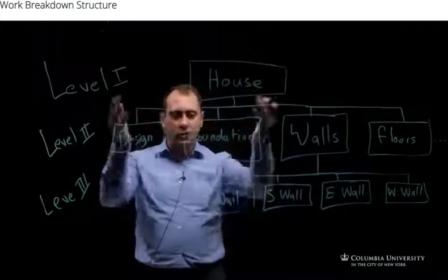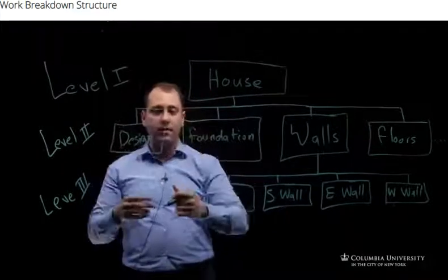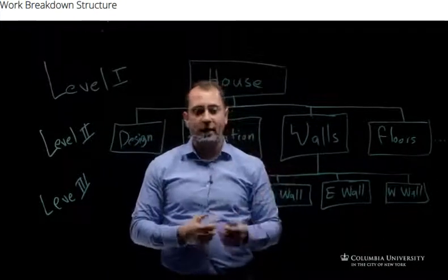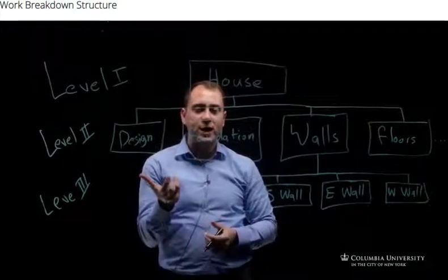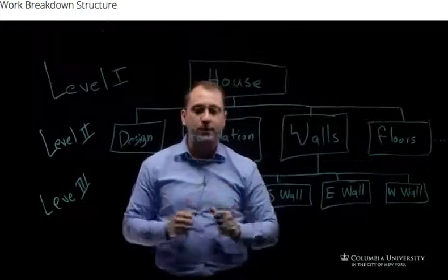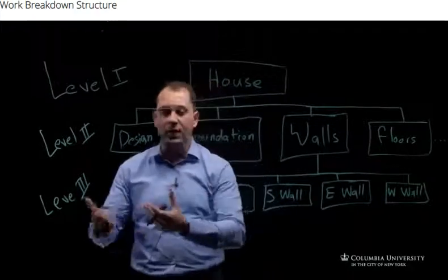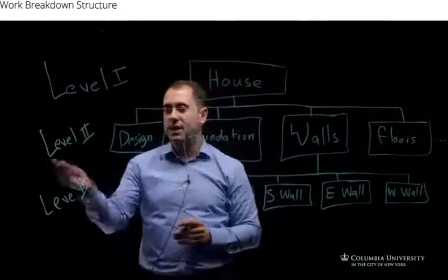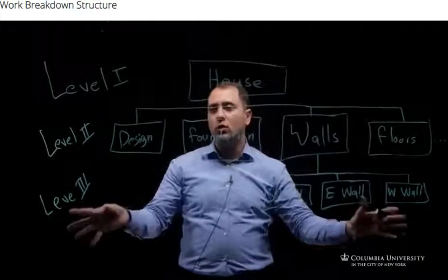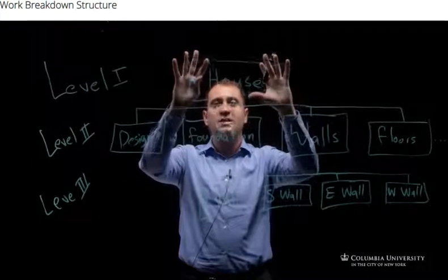For example, I want you to think while you're watching, what would be the level 3 of a work package of foundation, for example. A foundation could look like we have an excavation for the foundation, as well as putting the actual footings, or let's say for simplicity here, if the house needs piling, so let's say we have piles in the foundation. So these could be 2 work packages in level 3 for the foundation work package in level number 2. As you can see, all these work packages then will go towards the higher level, which is the main deliverable of our project, which is the house.